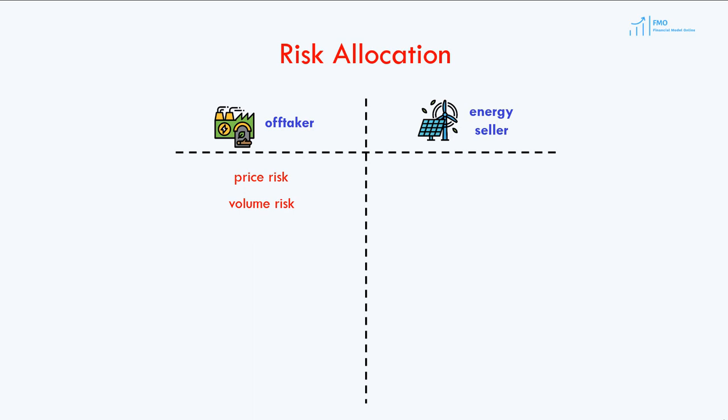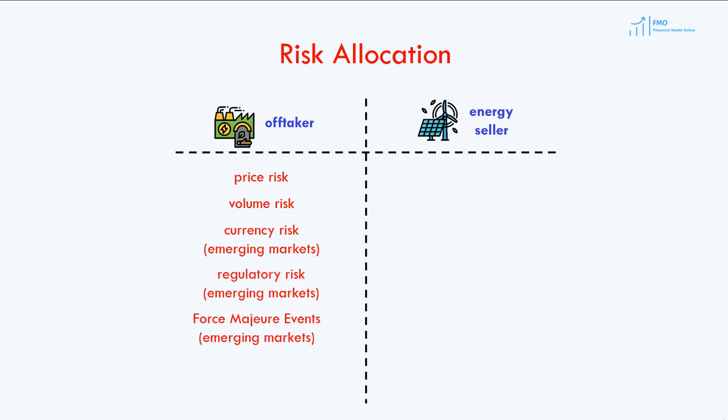The price risk is the risk that energy prices may be lower in the future than the PPA fixed price. Volume risk is the risk that the energy bought under the PPA may not be necessary; however, the off-taker still has to pay the energy seller. In addition to the price and volume risk, in emerging markets, the off-taker also takes the risk of adverse currency movements, political and regulatory risks, and the risks arising from force majeure events.